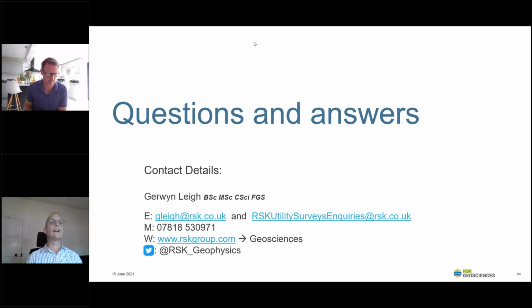Okay. How many geolocations can sensibly be covered in a day? It depends on the site. So in a busy urban area, I remember when we were doing a big site investigation in Brent Cross, I cleared 2 locations in a day, and that's all. And that was purely because it was in an area that was absolutely riddled with services, service covers, had to lift it all, traced it, mark it down on the ground, try and work out if all of the records corresponded to what I found on site. So it took a long time just to do 2.